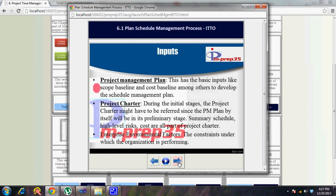The schedule management plan should document how to bring in resources and how to offload them, all based on the timeline, cost, or scope. If a milestone is specified in the project charter — say the project is required by a certain date — your approach will differ compared to a project needed in one month versus six months. The baselines are really important, and the triple constraints — scope, time, and cost — go hand in hand.